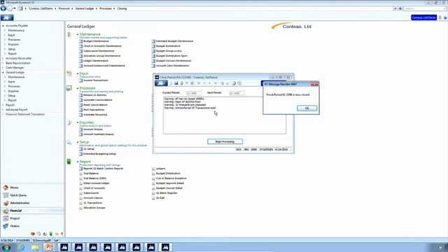So let's talk about why we would care about these records, or why it's important that we get these messages. If you think about the value that project gives you, we want our projects to be as current and accurate as possible. And so if someone has entered a voucher in AP and they haven't released that voucher yet, and that voucher applies to the period that we just closed in project, that voucher will be released in, let's say, period 5, but project's now in period 6.